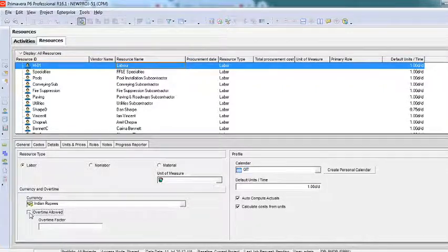But if you check this box and set the overtime factor, for example I'll say it's 1.2. You understand what 1.2 is? 1 is nothing but 100 percent, meaning whatever the price is, that is 400 rupees. Now in a ratio of 1.2, this 400 should be calculated again on an hourly basis, per hour how much we are paying.